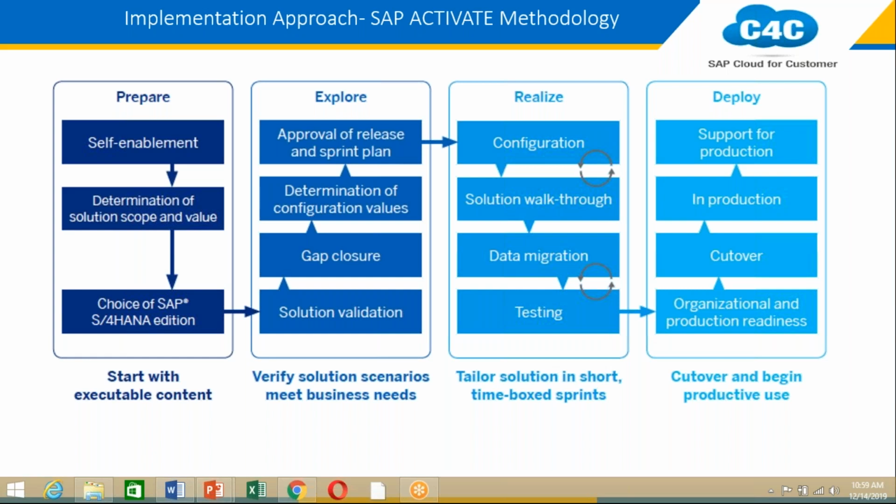Now what happens during a UAT phase? During a UAT phase, client knows the capability of the system, because during testing they come with different scenarios, different aspects of a system, and they also understand the system capability. Now what happens at that time? Normally in all the projects, client comes with new ideas and new change requests.